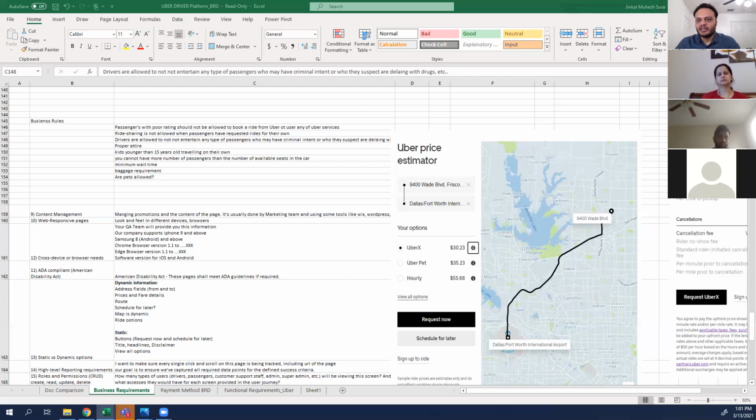So for example, iOS updates happen once a year. Probably we are on iOS 14 right now, but iOS 14 will have 14.1, 14.2, 14.3. Why? They rolled out the first product, but now they're constantly, incrementally iterating and fixing those bugs, right? So every month there is a new release. 14.1 comes today, next month 14.2 will come in, after that 14.3 will come in. If you go the Waterfall way, you will not see these releases. You will see 14 and next year there is a 15, that's all.